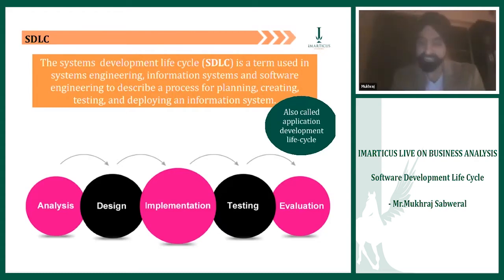Rajesh needs those stakeholders to map the entire process in order to evaluate what the current effort behind running that process is, what the related cost is, why this kind of automation is required, and if it is required, at what points of the process it's going to be done, unless he's automating every single process step. That's what we call analysis. Analysis, guys, is generally done by the BA only, which means the BA would do an as-is and a to-be analysis. He will be supported by his IT teams.